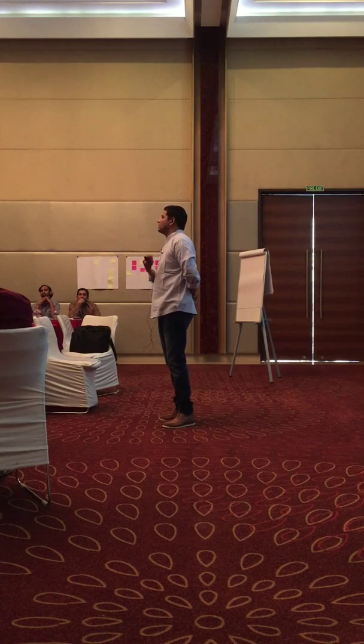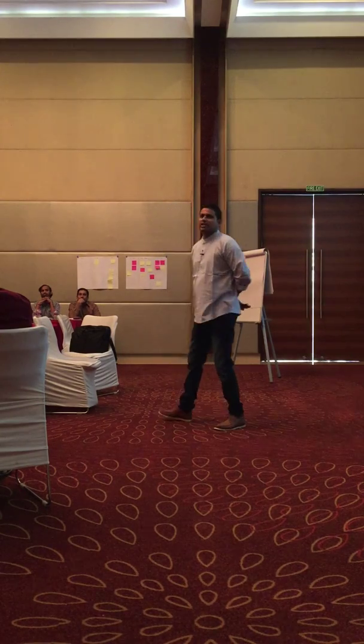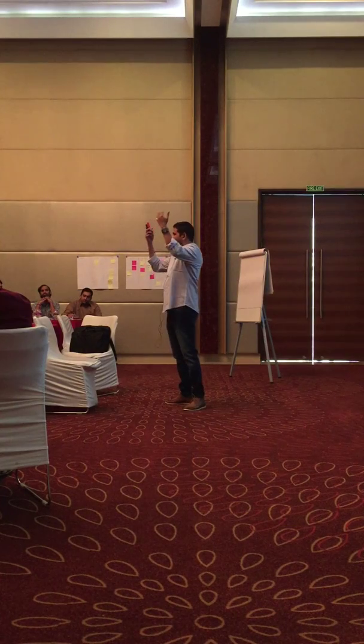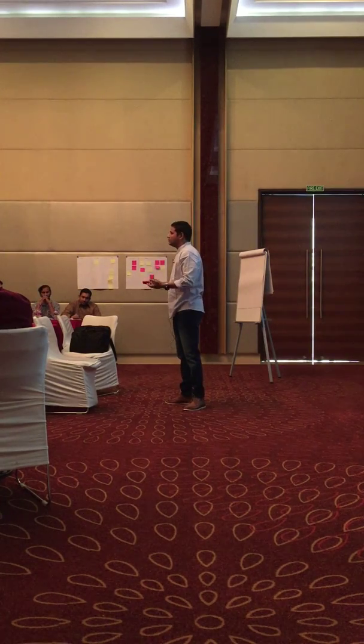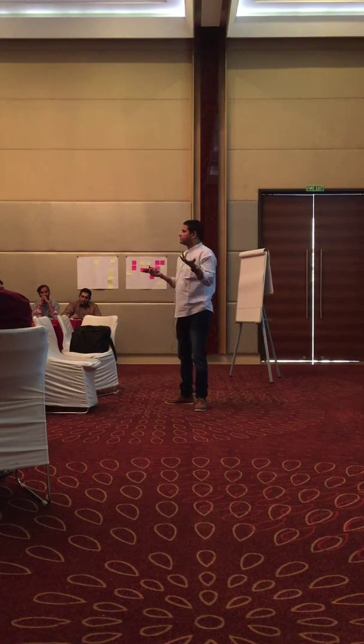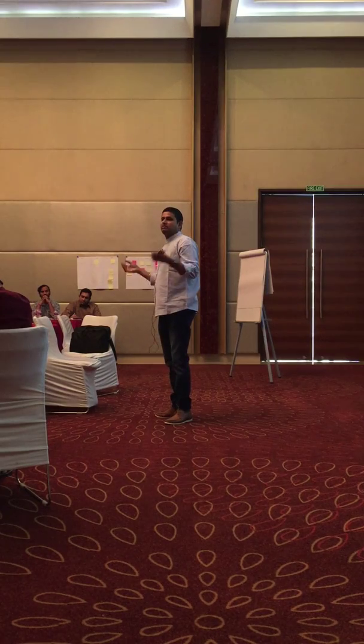You are renaming the product backlog refinement as discovery in that case. In Scrum terminology, we call it product backlog refinement, where sometimes you split larger stories into smaller stories, estimate them, discuss some of the higher architectural issues, and all these things. So if you call it discovery, please rename it to product backlog refinement. That solves the problem.